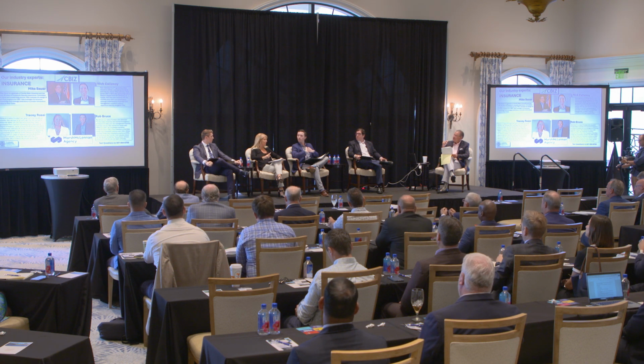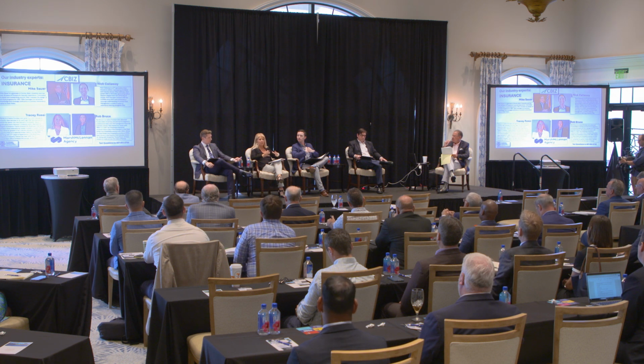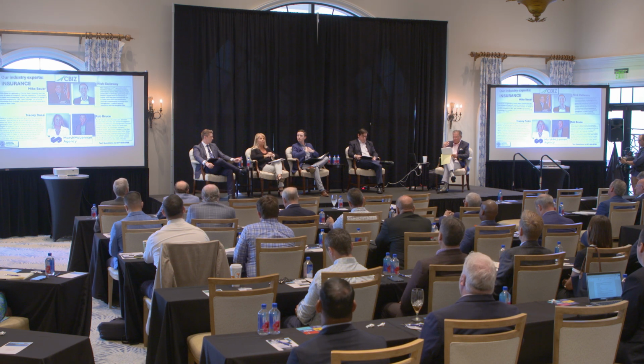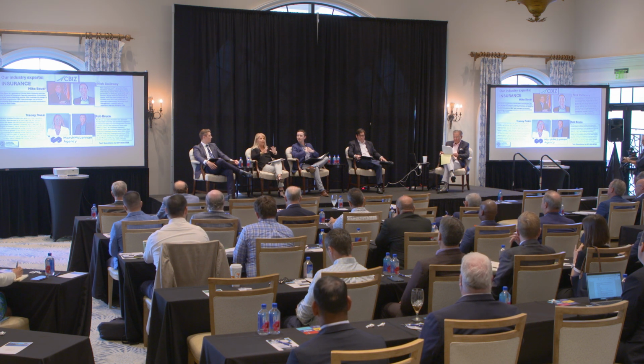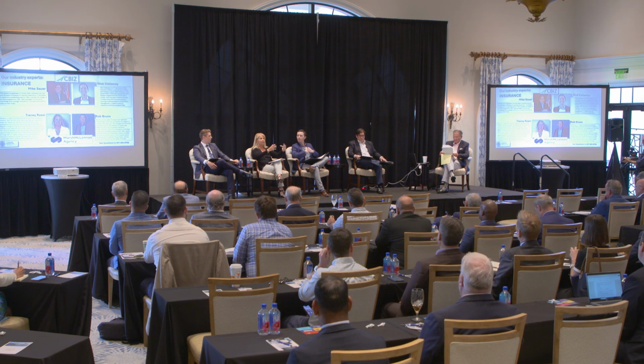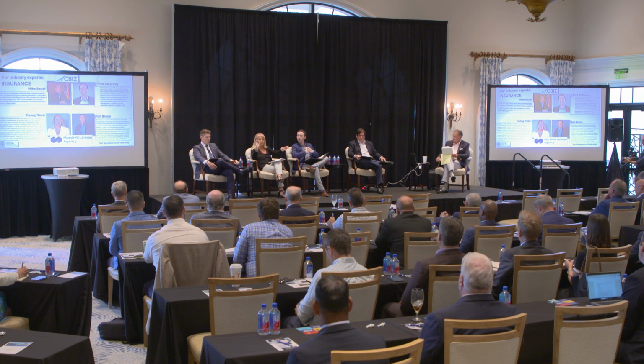And the one thing I wanted to add to that real quick, we spoke about it last week, is we always are concerned in Florida, South Florida, or actually Florida in general, of wind. The carriers now are just as concerned with fire. And the clubs, and God bless you, they're all wonderful. They're getting bigger and bigger and bigger as far as your buildings and your total insured values. So now most carriers are saying, well, okay, if your clubhouse is here and you're building a fitness center, how far away are they? If I've got 20 million here and another 15 million here, and the fire could actually somewhat connect, we're out. We're not happy with that.